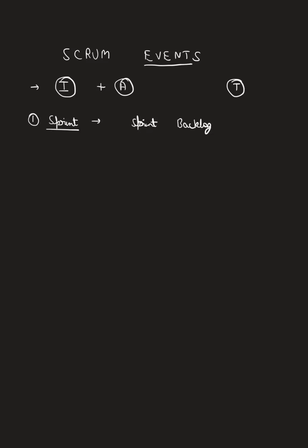And every sprint has a sprint goal. That also I told you in the previous lecture. There is a commitment, the sprint goal, and the sprint goal cannot change. The sprint backlog can change. What is the time period or time boxing of this sprint?